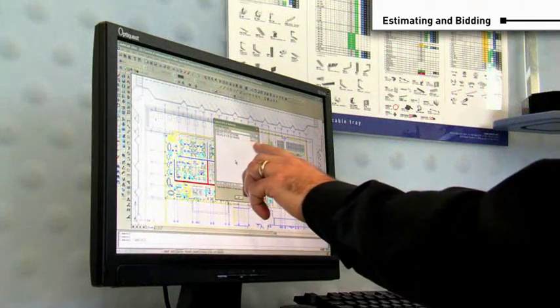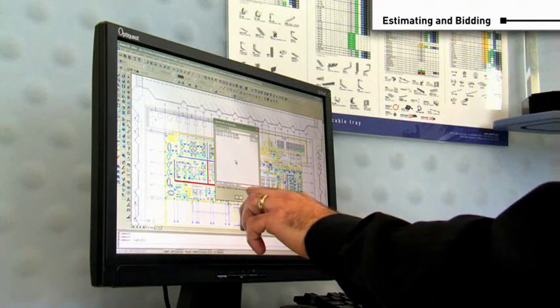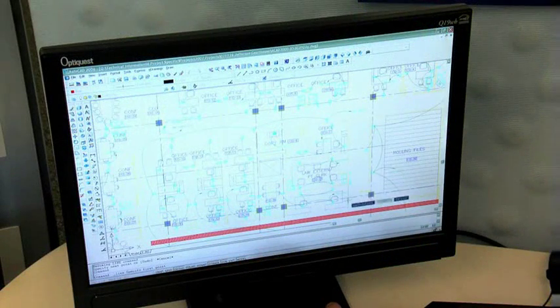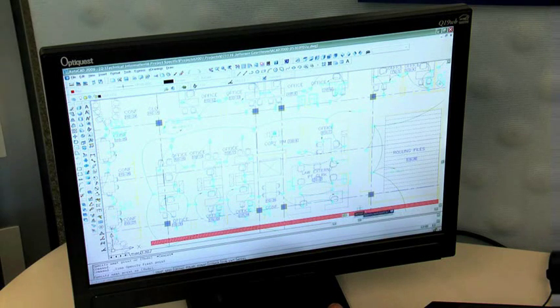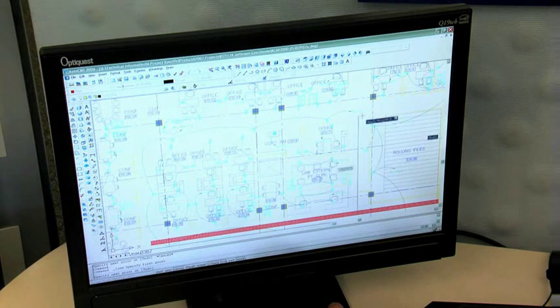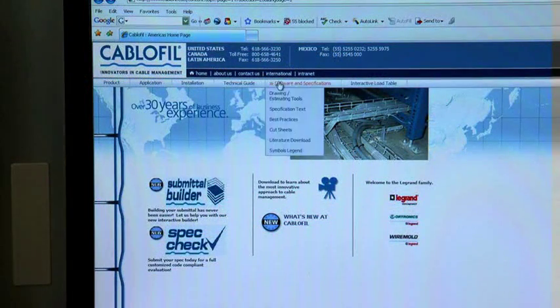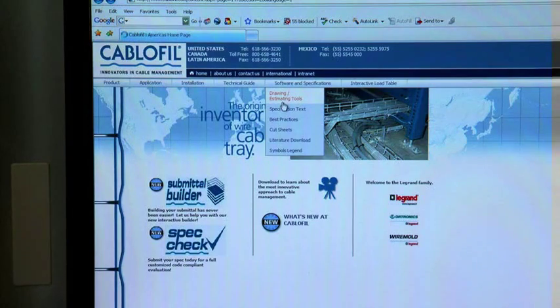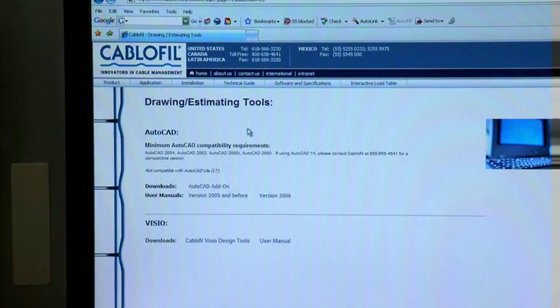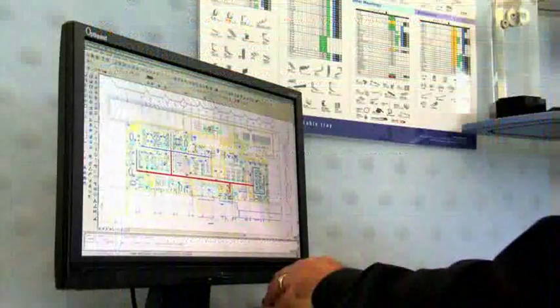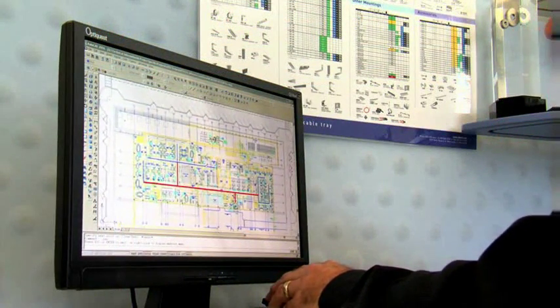Now that you've determined which tray size and finish is needed, you can get a fair estimate of the project by using free design tools from Cablofill. If the plans are in AutoCAD, use our Cablofill AutoCAD add-on as an overlay of the existing cable pathway. It will estimate the total footage of tray needed for your installation. You can download the Cablofill AutoCAD add-on at www.cablofill.com. Just click on the software and specification link.